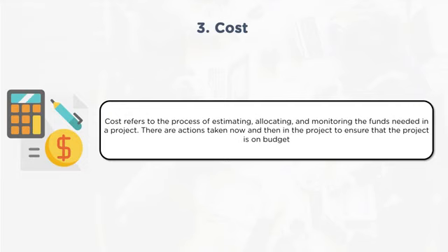That will be a cost baseline. So once this estimation and allocation of budget happens, that will become a base, and any deviations from that cannot happen so easily. Any deviations because of addition of scope can be handled through change management. But in an idealistic scenario, the cost should not escalate or come down. Organizations can also set certain tolerances at the project level, considering various scenarios, like the scenario of risks, or something which deviated from the deliverable. So to what extent it can deviate, that tolerance will also be set from the economic or monetary value perspective.